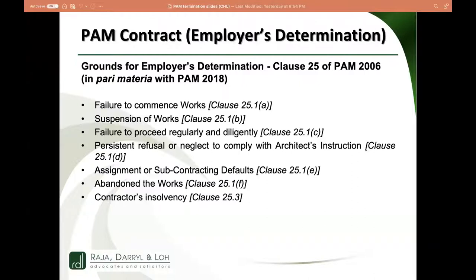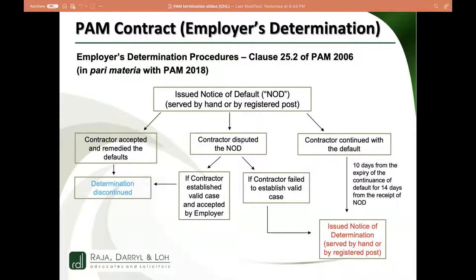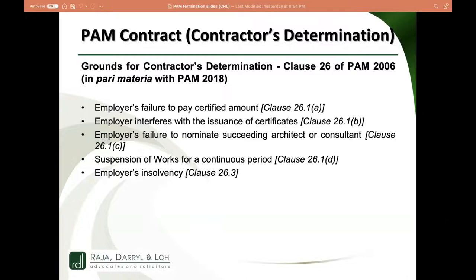The procedure adopted in PAM is always the two-step procedure: a notice of default, and then a notice of determination. You must have grounds to issue a notice of default and serve it properly. Various scenarios will then follow — whether the defaulting party remedies the default or not. If they don't remedy the default, only then does your right to issue the notice of determination arise. All these procedures and timelines are well mapped out in the PAM contract and must be followed.